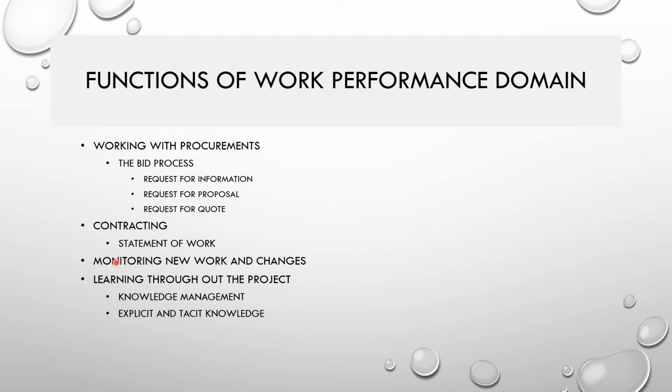And the next aspect is monitoring the new work and changes, right? We have a contract, we have terms and conditions, so how am I going to manage the new work and changes? If you're following the adaptive approach, accepting change is very easy. You can accept the change in any sprint or any release, whatever the time is, right? The contract will talk only about how many people they are going to use and what the per hour rate is, that's all. In a predictive method, you will talk about a fixed bid, right? You go with a fixed bid kind of scenario.